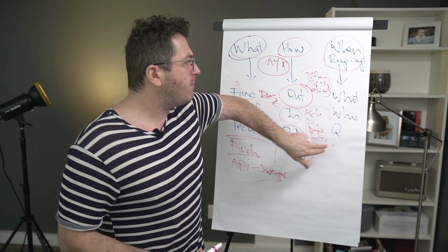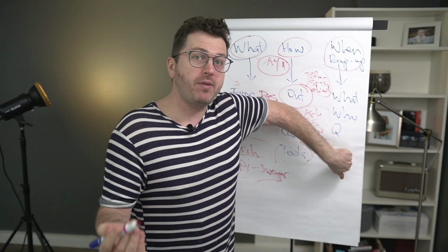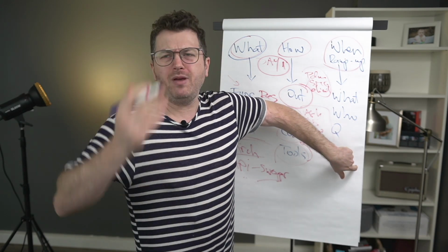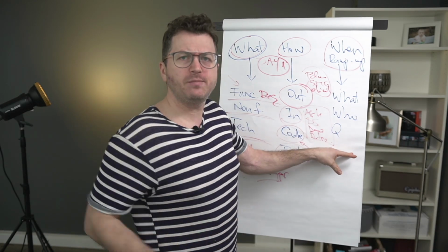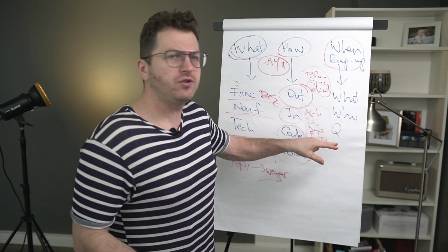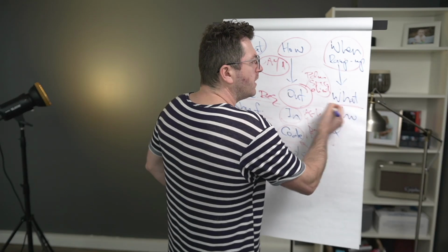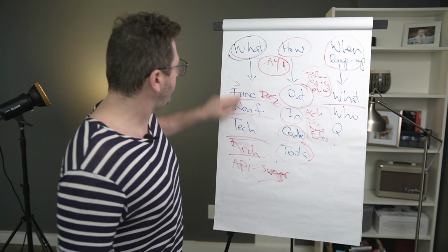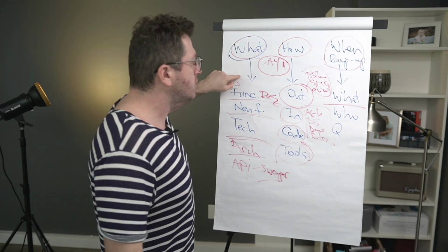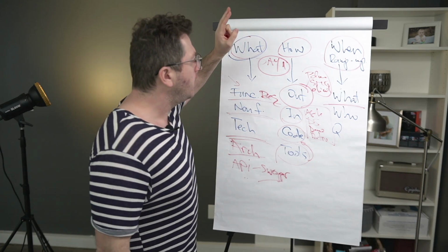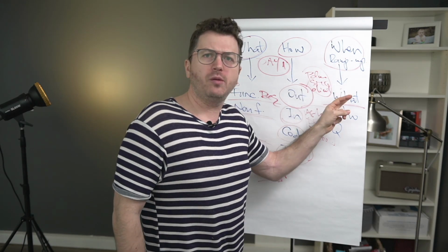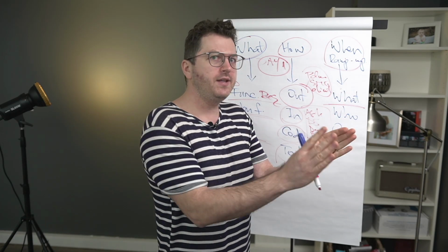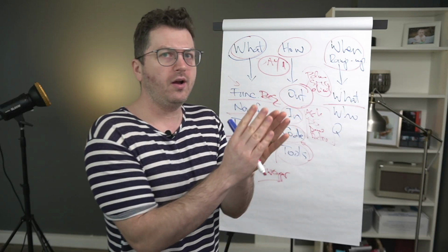And there are three main things that have to happen during the ramp up. During the ramp up, a new developer, a new team member, even if it's not in the development team, all these apply to any other team. The first thing, what is he going to ramp up on that day? Choose one of these, right? He's going to read the functional requirements, or he's going to understand how to work with the outside teams. You have to tell him exactly what he needs to focus on to ramp up.